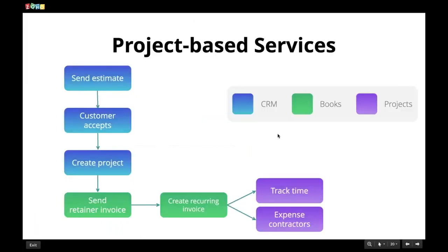If you wanted to, you could go crazy enough to do the time tracking for every single task in your Zoho Projects project, and then actually send out an invoice for all of that using that finance thing I was showing you. But for most companies, I think it'll be much simpler to do time tracking for your own records, but then when it comes to invoicing your client, to just do it in installments like that, and maybe set it up so they're paying 20% upfront and then just paying a percentage chunk at a time for the rest of the duration of the project after that.